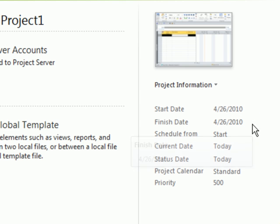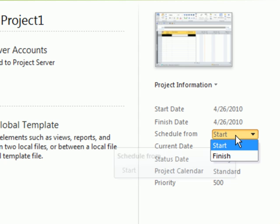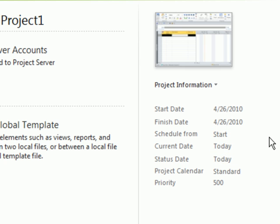If you wanted to set the finish date instead and have Project schedule backwards from a deadline date, you can set the finish date instead. It also wants to know how are you scheduling this? From the start date or the finish date? It would be up to you and your project. I typically use the start date because it's easier for me to anticipate a finish date by using Project to do so. If it's the reverse, if you select finish date, you want to make sure that Project is scheduling from that finish date.